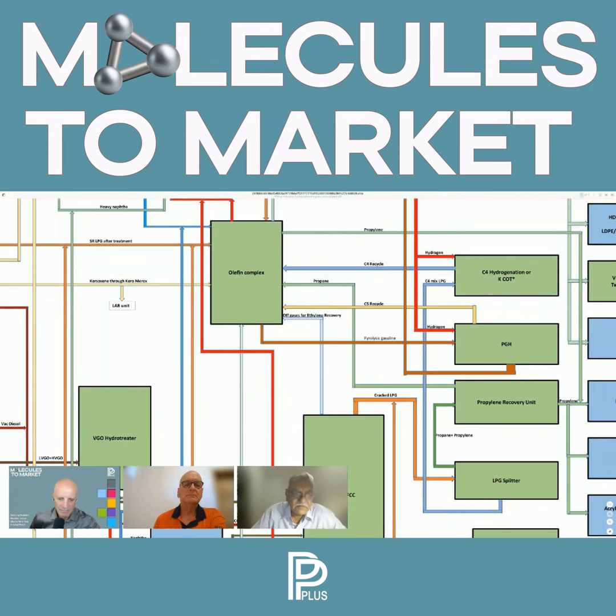In your parlance, possibly you call it FEL2. Now, this is the time where my main objective function is that I will arrive at a plus minus 10% estimate. If I am not able to get to plus minus 10% estimate, which I have to guarantee to the board, the project investment approval does not come.